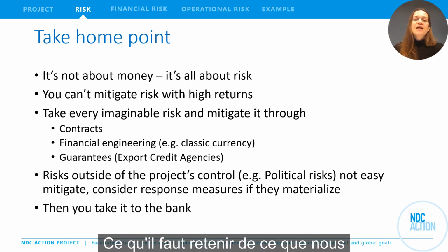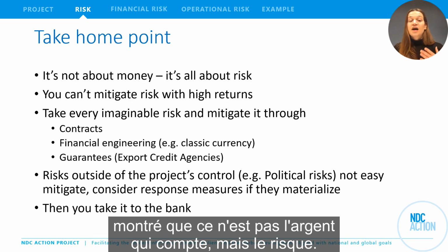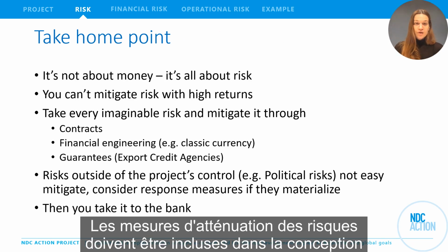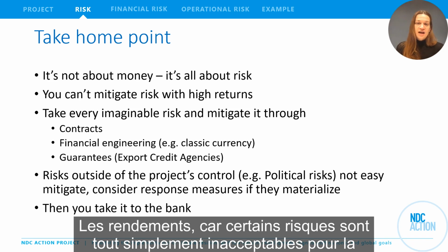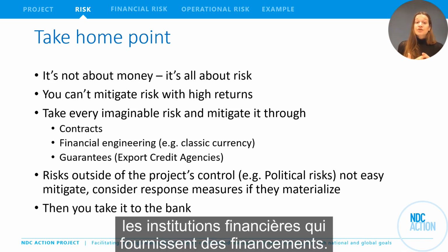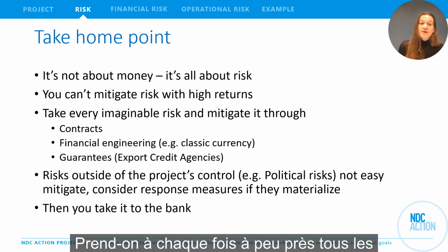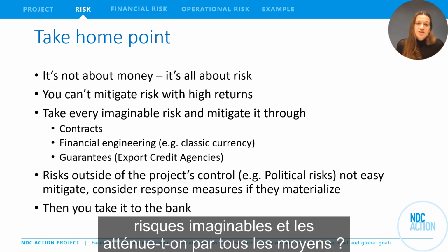The important takeaway from what we discussed so far is it's not about the money, it's about the risk. Risk mitigators need to be included in your project design to gain financing. You cannot mitigate risk with higher returns, as some risks are simply unacceptable to the mostly risk-averse financial institutions that provide this finance. Thus, every time,